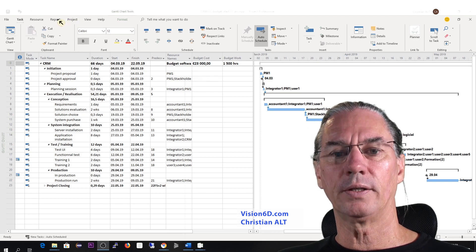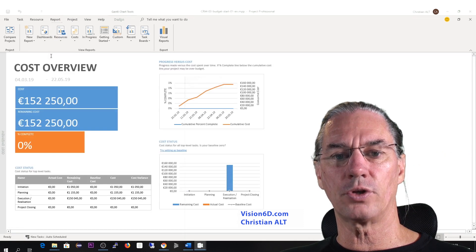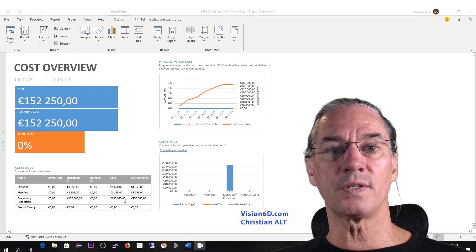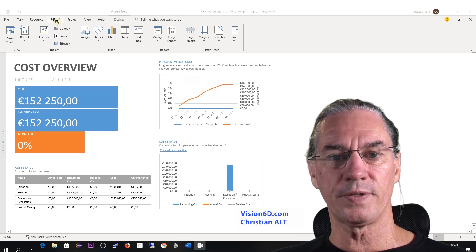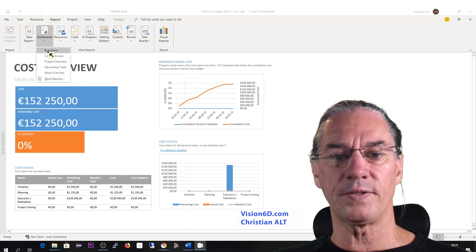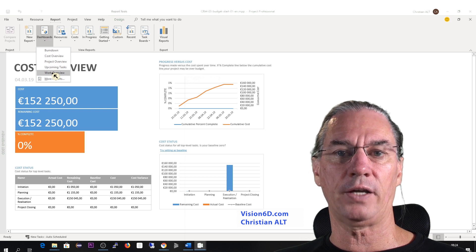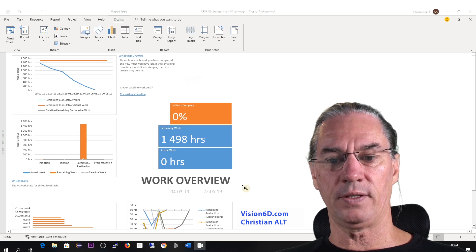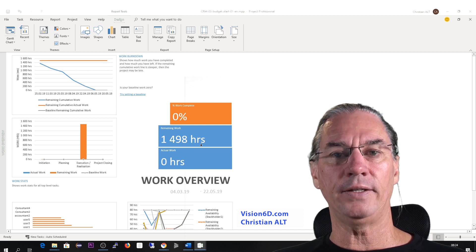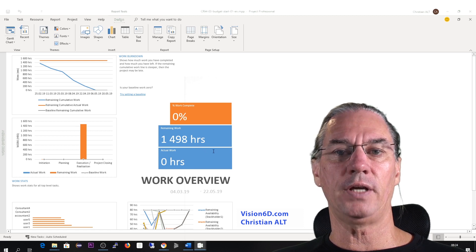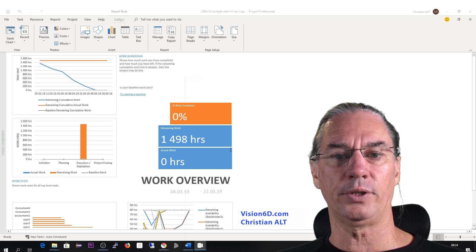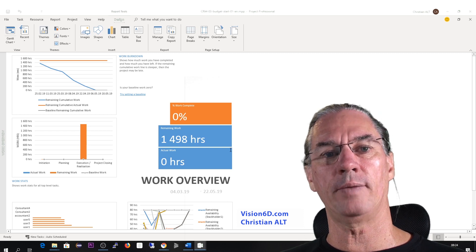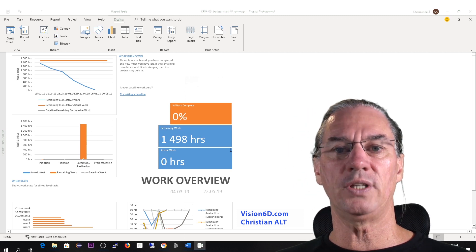I'll go back into reports to show you, first of all, that nothing changed on the cost overview — those budget resources of type budget don't have any influence on those reports. There is a second report: looking at the work overview among the dashboards, I had a calculated value of 1,498 hours, which I simply round to 1,500 for this project. This tells you that the project values will be used by MS Project for further comparisons in the evolution of the project.